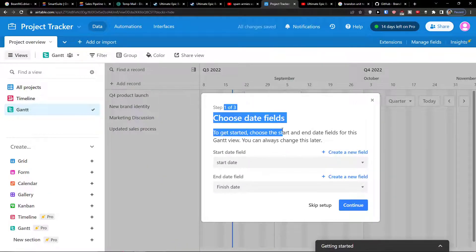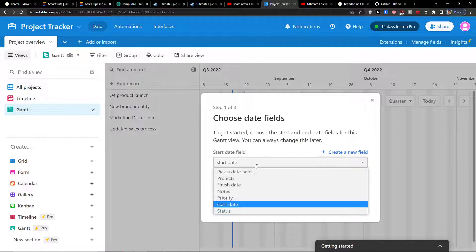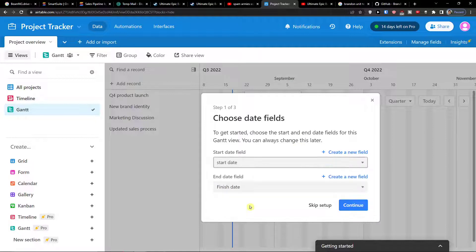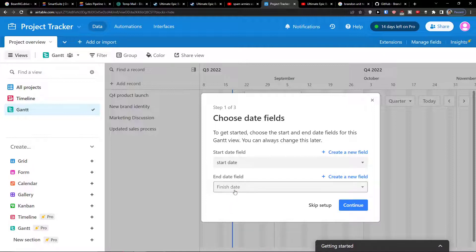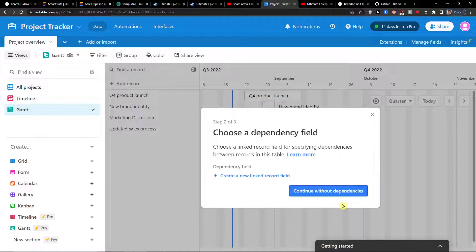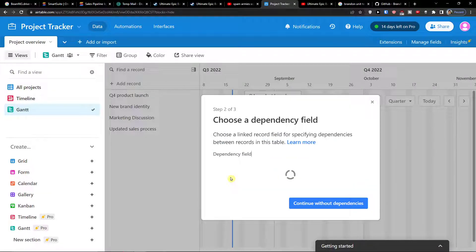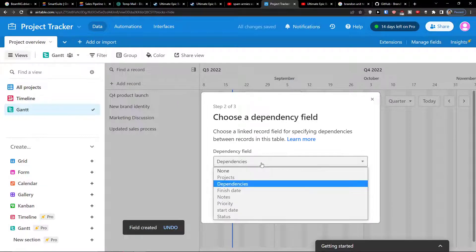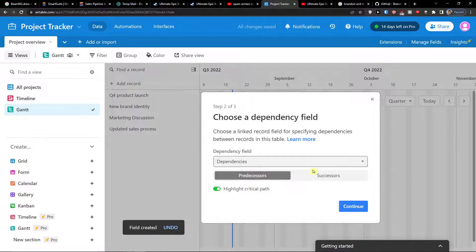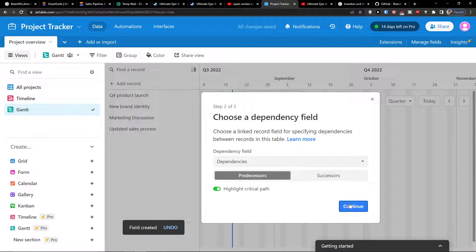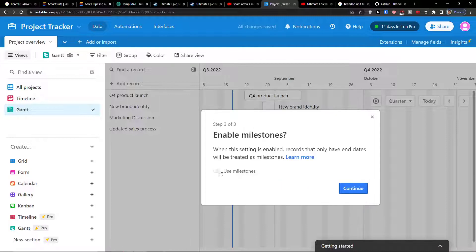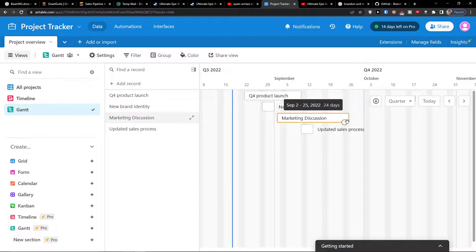Now choose date fields to get started. Choose the start and end date fields for this Gantt view. So let's say I have the start date and then you have the end date field. Of course you can easily create a new field and then choose that. Choose a link record field for specifying dependencies, and if you don't have any dependency you can create a new dependencies. So you see dependencies, predecessor, continue, setup complete.